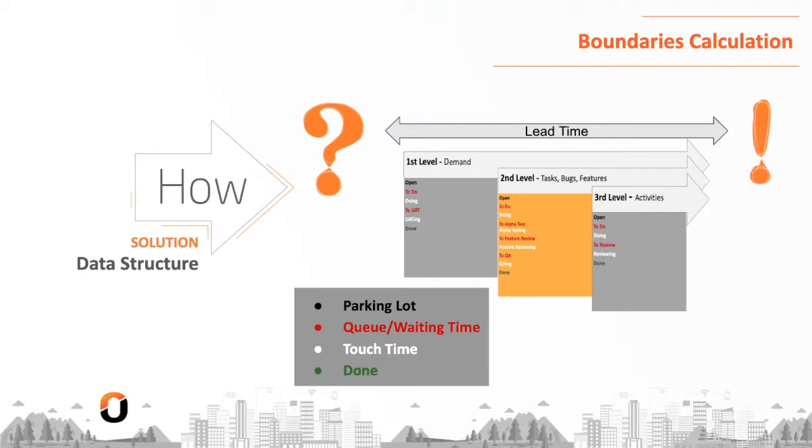At the second level, we have the features themselves, sometimes including bugs, which must follow the INVEST principle: independent, negotiable, valuable, estimatable, small, and testable. At the second level, use T-shirt ballpark clusters that represent a collection of third-level activities. These things shouldn't last more than 2 weeks, and they have to be deployable and testable from the customer's point of view.